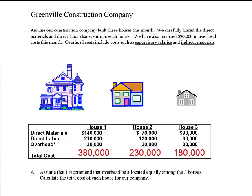So that was a simple allocation of overhead: $90,000 divided by three. At this point you should ask yourself, is that a good way or even a fair way to allocate overhead costs? These three houses are of different sizes and different complexity. Do you think they each used an equal amount of indirect materials or an equal amount of supervisor attention? I'd guess no — the more complex house likely used far more indirect materials and required much more supervisory skill than the simple starter home.